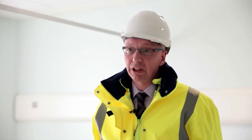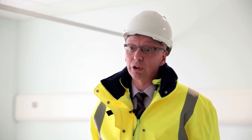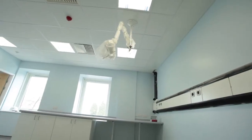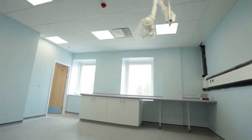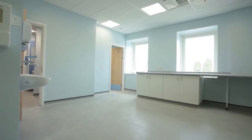You mentioned commissioning. Can you tell me a bit more about that? This is probably the most crucial time of any capital scheme. It's the period of time between us actually gaining ownership of the facility from the main contractor and leading up to the unit becoming operational. It involves estates and facility staff doing a final check of the facility to make sure that it's fully operational, and also making certain that the end users, i.e. the staff, are completely happy with the unit prior to the treatment of patients.